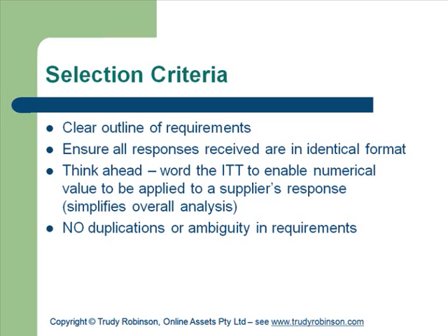So when you write this questionnaire or this information that you send out to people, you have to give it to somebody who wasn't involved in the process and say, tell me what that means to you. And if it comes back and they say, oh, it's just too hard, you should internally perhaps have a limit on what you send out, so a maximum of 4 pages. So you might have a maximum number of pages, a maximum number of questions, or a recommended set of information that you can send out, pick out 1 out of 5 of this or that, so that when you're sending it out there it's not too onerous. You need to do it, but you need to do it with common sense.